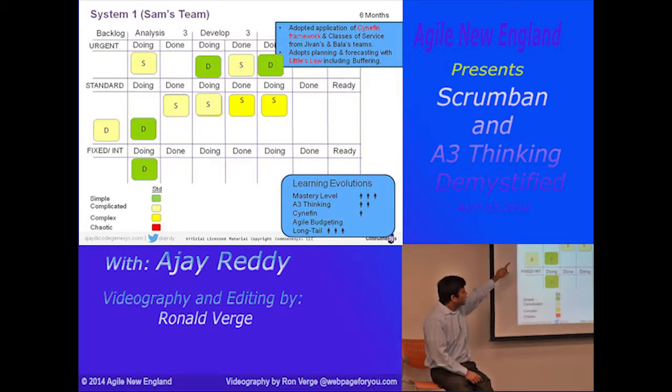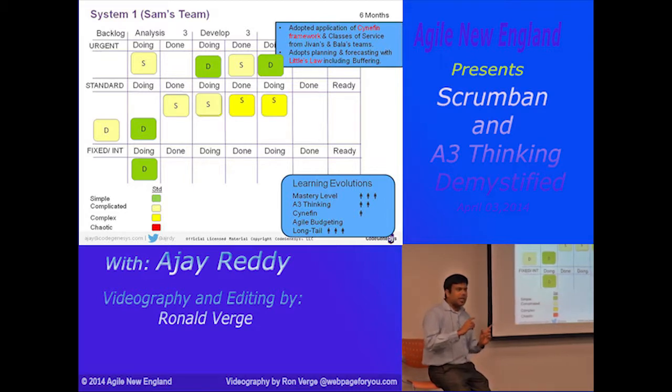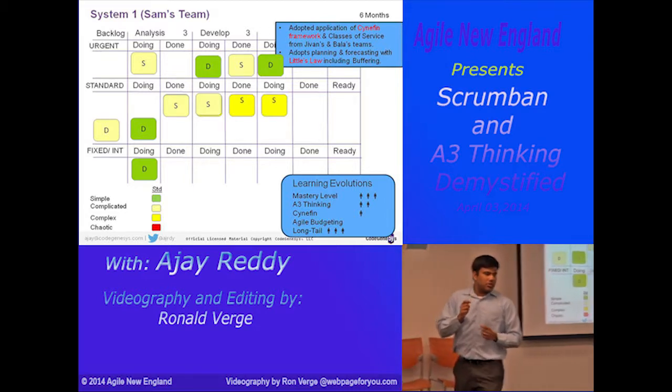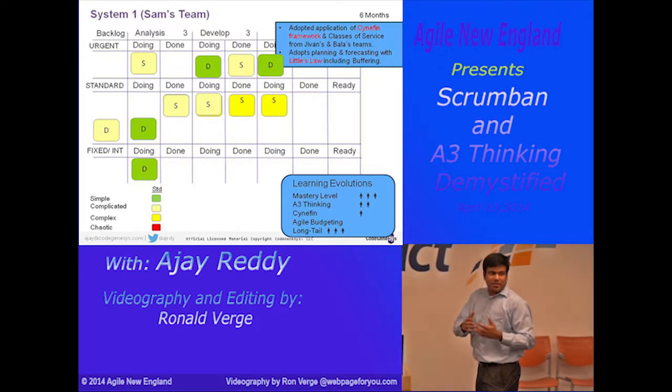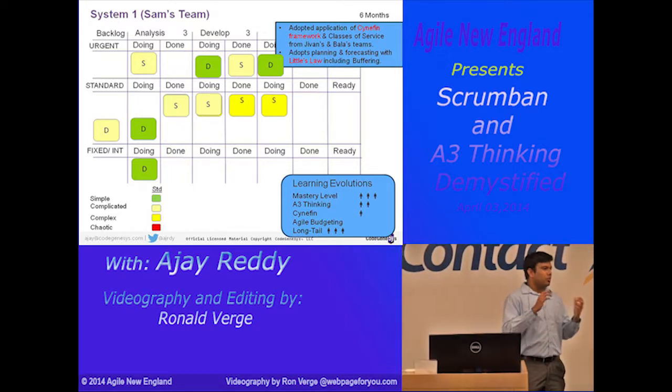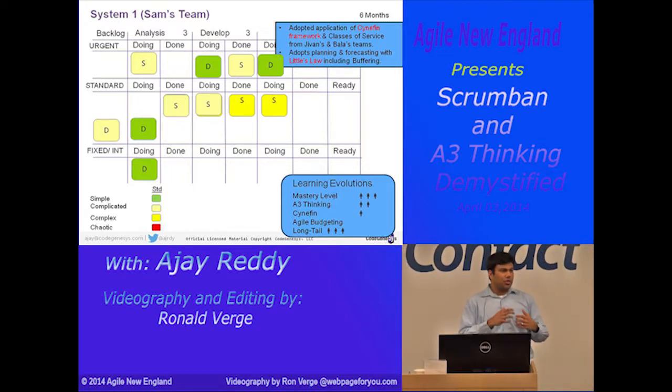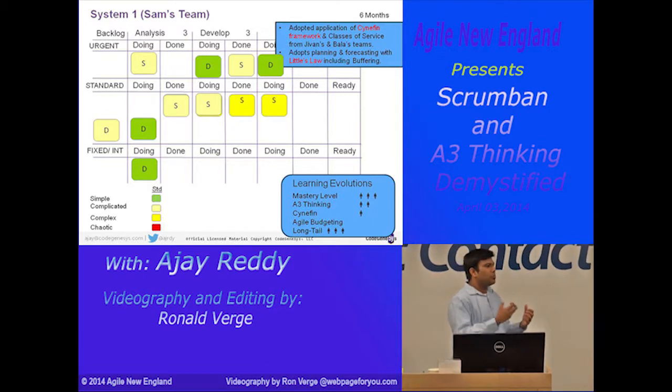But they were also doing something else. They're starting to put Ds and S's here, which is from a market standpoint. So they're looking at work items from both the complexity and from a market standpoint. And they were using that to help make pull decisions within the system.